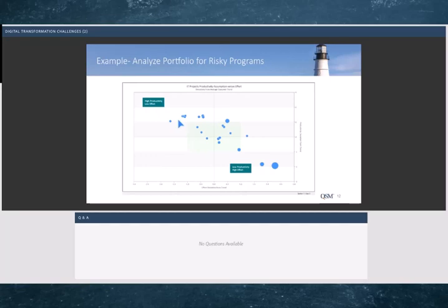And you can see that some of these projects are outliers to where we want to be. These are estimates where, as you can see on the chart here, we said too high of a productivity, low effort. On some of these estimates, if you're working in a vacuum, only looking at an estimate and not the whole portfolio, maybe this estimate looked okay. But when we compare it to the other projects in the overall transformation, we can see that we assumed too high of a productivity on this estimate, and therefore the cost or the effort goal is a little bit less than what the industry data says it should be.